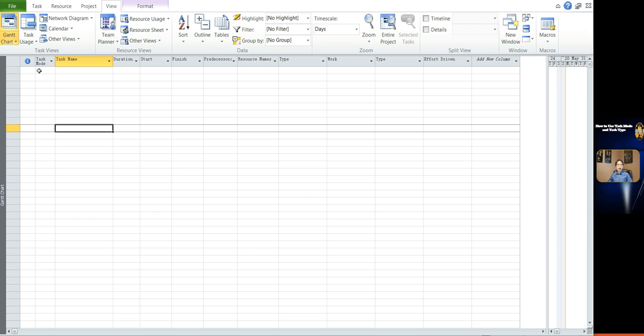After each task has a duration and task dependency relationships, the base for schedule calculation is established. Then, if you use the auto schedule task mode for each task, you can calculate the schedule and accurately predict the project duration through the critical path.